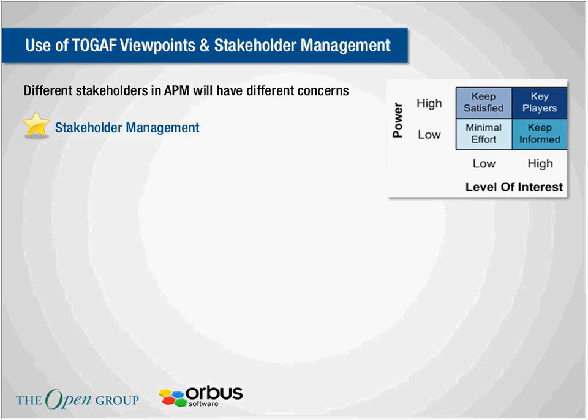First, TOGAF defines the technique of stakeholder management. You plot stakeholders on a grid according to how they can affect you. You can estimate and manage the level of effort you spend on keeping them happy, keeping them involved.